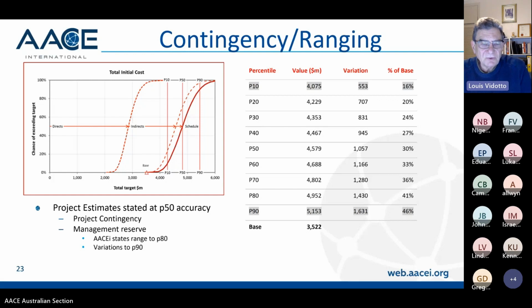Yeah. Cost is certainly different, and I tend not to benchmark costs, but certainly effort is what I think is important. Yeah, well, the unit costs keep changing quite rapidly these days. Yeah, that's right, which is reflective of part of the problem. The quantities don't, but the cost per unit quantity changes a huge amount.